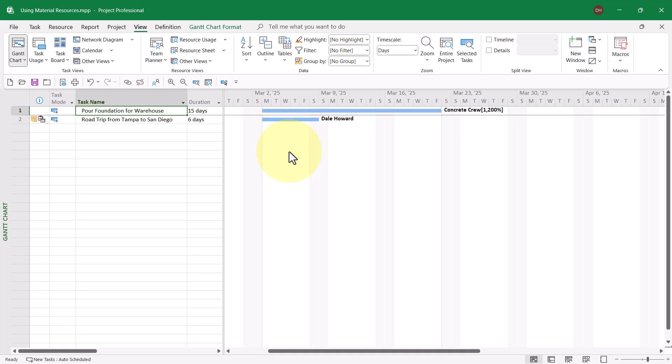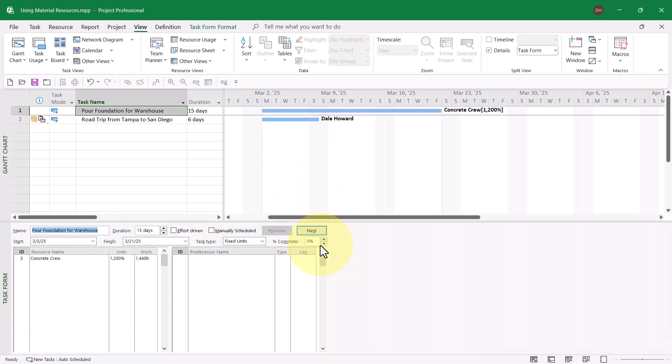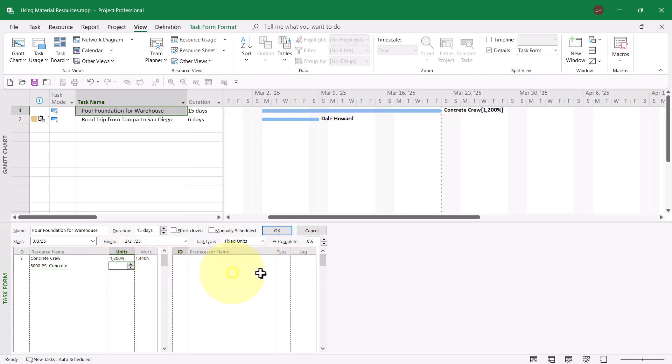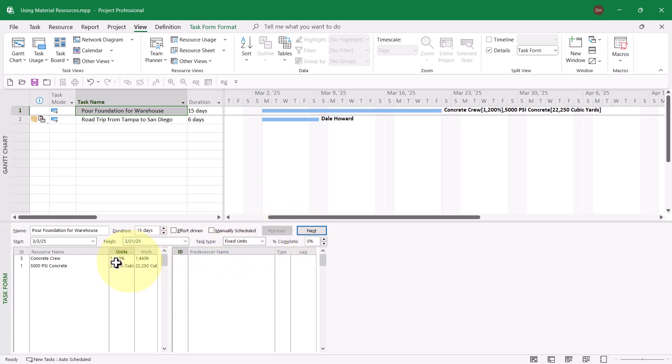Here's how to assign a material resource using a Fixed Consumption Rate. Right mouse click anywhere in the white or gray part of the Gantt chart screen and choose Show Split on the shortcut menu. Then, in the Task Form pane, select the material resource. In my case, that's 5,000 PSI concrete. And then, in the Units column, enter the amount of that material resource that will be consumed. Remember I said this is a huge warehouse. We will be consuming about 22,250 cubic yards. Enter that number in the Units column and then click the OK button.